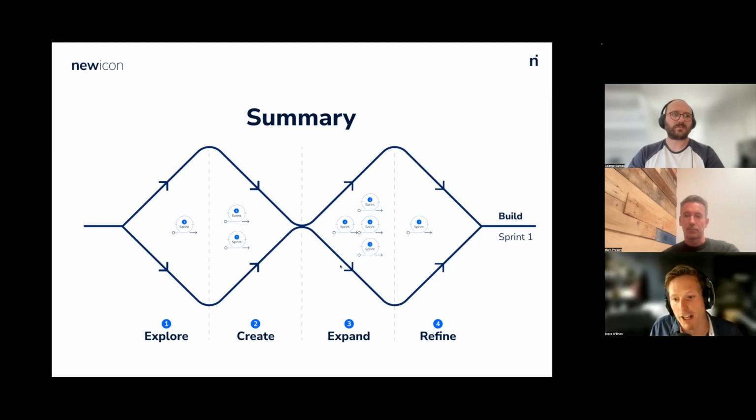And then refine, we chunk that down into, well, what's the scariest part of this project, or what's the highest value? And we'll plan that, and we'll restructure and recreate the prototypes for sprint 1 and for sprint 2 and for sprint 3, so that everyone knows precisely what we're going to deliver and how it will work.